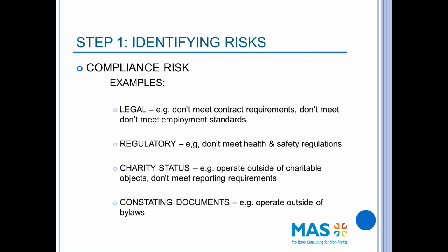One thing to keep in mind here is to separate the risk from the consequence. If I say the risk, for instance, is that I don't have access to my building, well, that's not the risk. The risk is fire or the risk is flood. The consequence would be that I might not have access to my building. So we need to focus on the risks. What are the actual risks in order to manage them? So one bucket to think about is compliance risk.